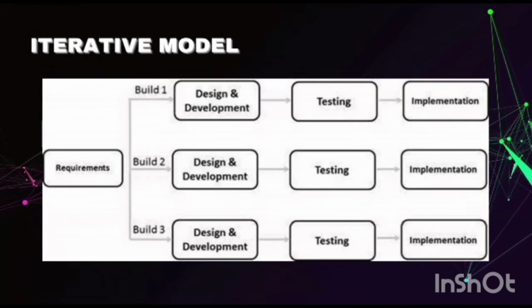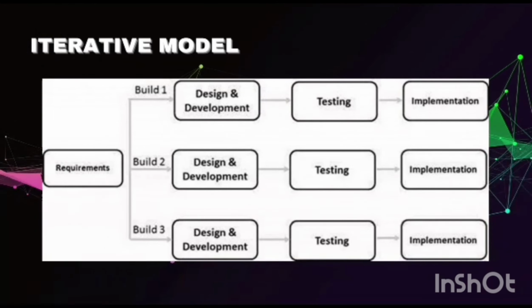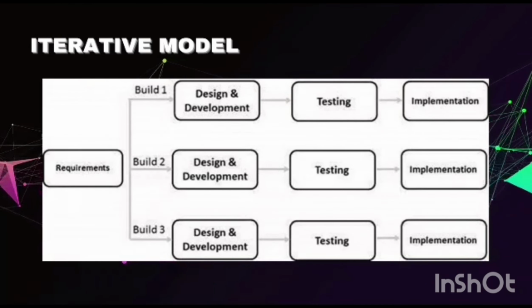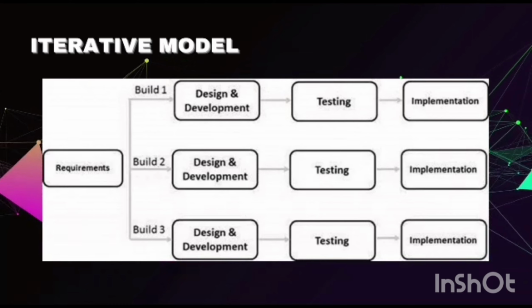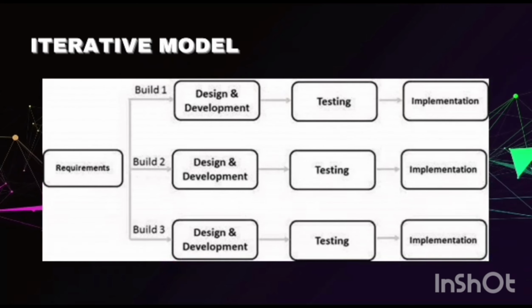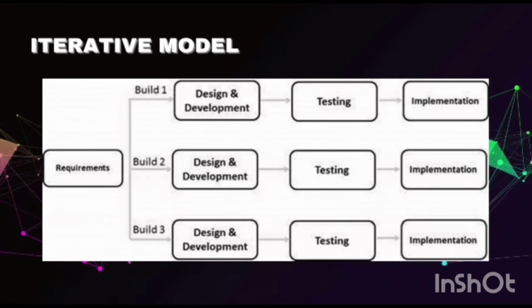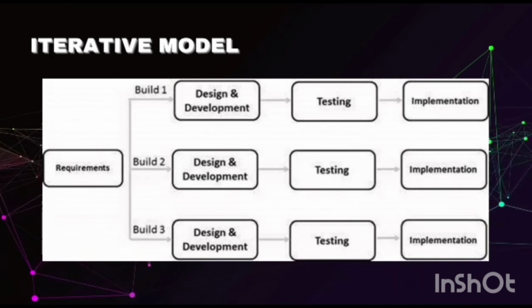In this incremental model, the whole requirement is divided into various builds. During each iteration, the development module goes through the requirements, design, implementation, and testing phases. Each subsequent release of the module adds function to the previous release. The process continues till the complete system is ready as per the requirement.